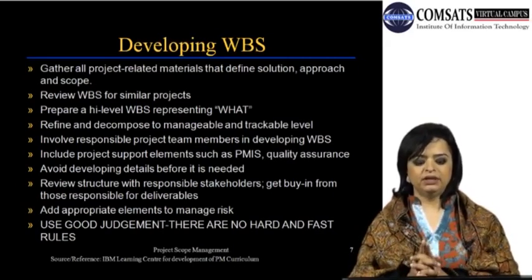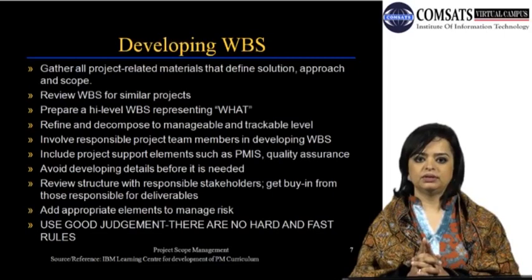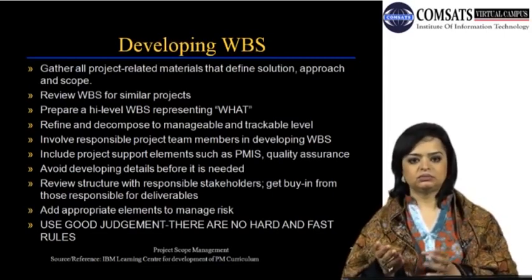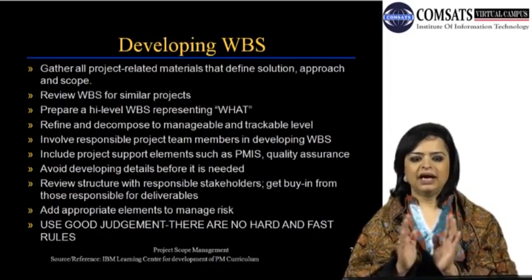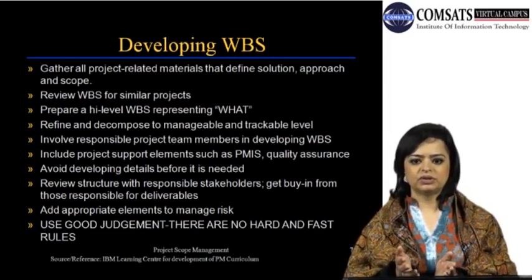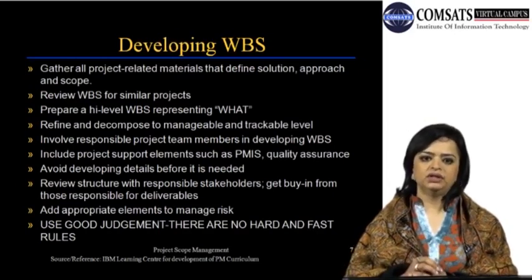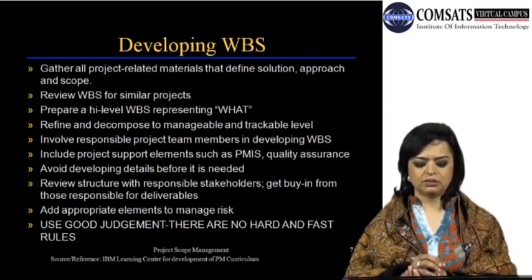But avoid developing details before it is needed. So if you're doing an IT project, identify how many web pages, the need, the purpose. Don't get into the detail of what is included in each of those pages.